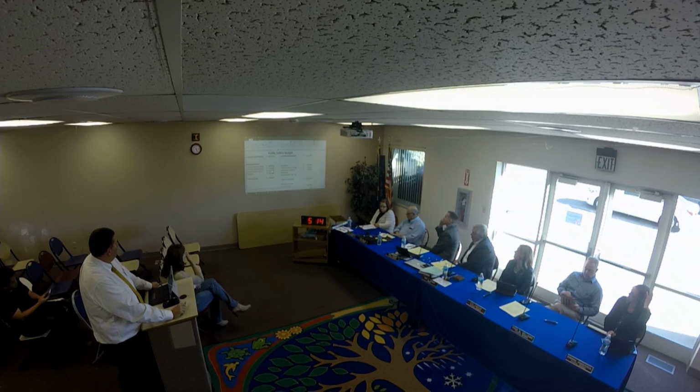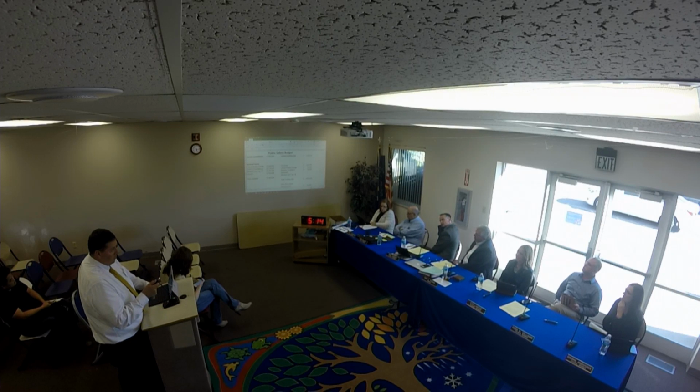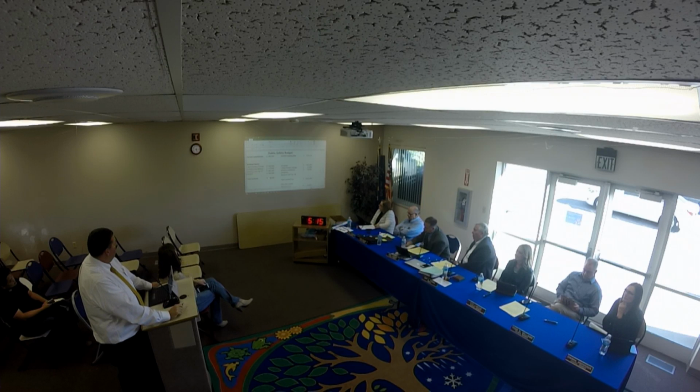And then we have our capital money from our budget that was completed in fiscal year 17. We have $475,000 of revenue over expenditure. Normally we turn around and put that into capital projects, spread it out through the various departments and needs in the city. We're recommending that of that 475, we take 400 of it and put it towards the building. Now we're going to talk budget a little bit later, and Denise is going to show you where the 400's accounted for, and then the additional 75, and what we're recommending to the City Council with that. And then we have, since we bonded and had that money in the bank as of last year, about $100,000 of interest off of that. So that's money we'll turn around and put back into the project.